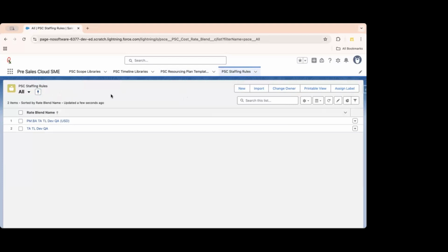You can't afford to have that technical architect juggle hours across multiple projects, because it is a niche role. So sometimes a business rule says I want a technical architect required on a project at least 50% a week or a month or a quarter or whatever it is.